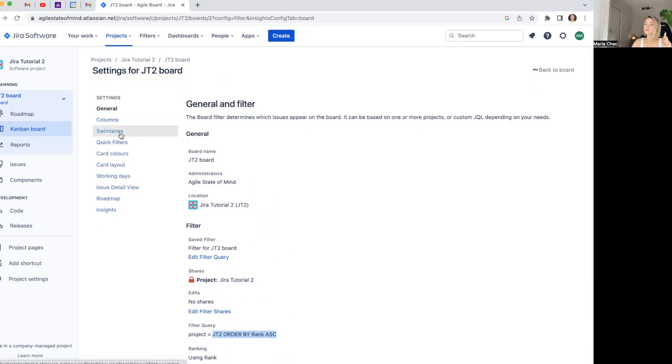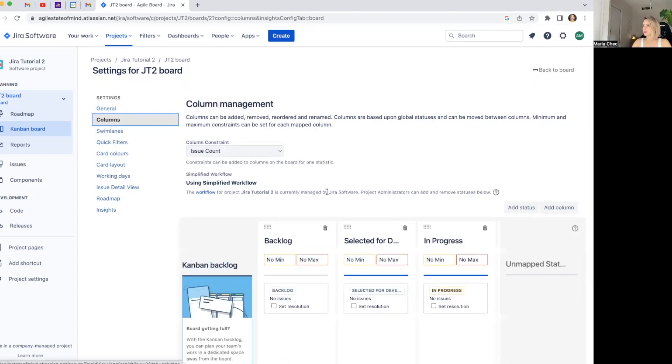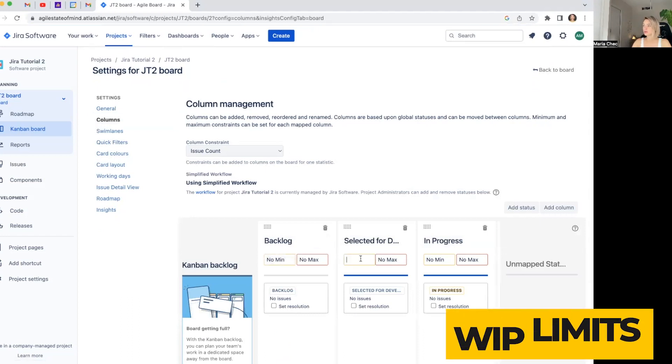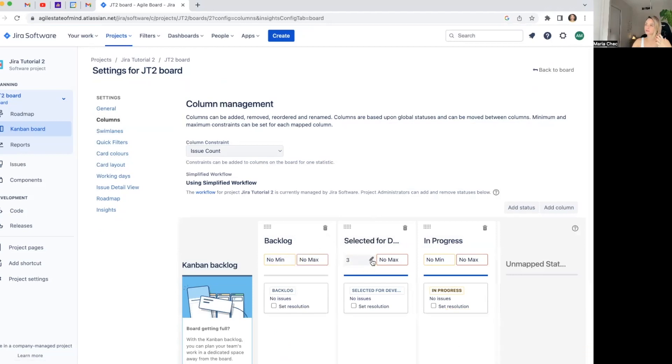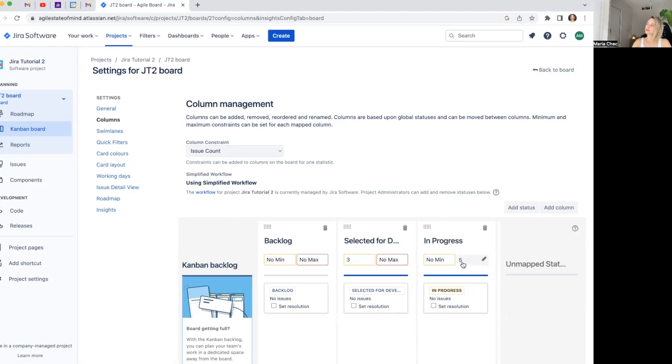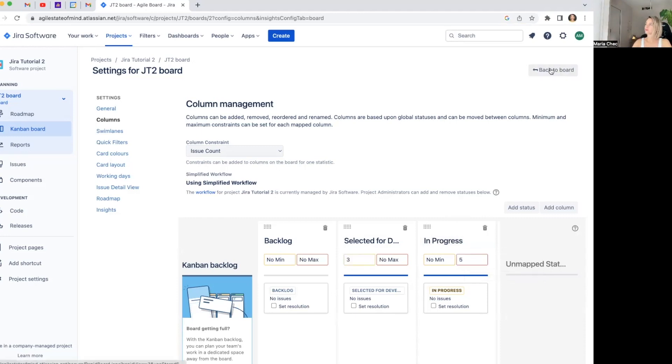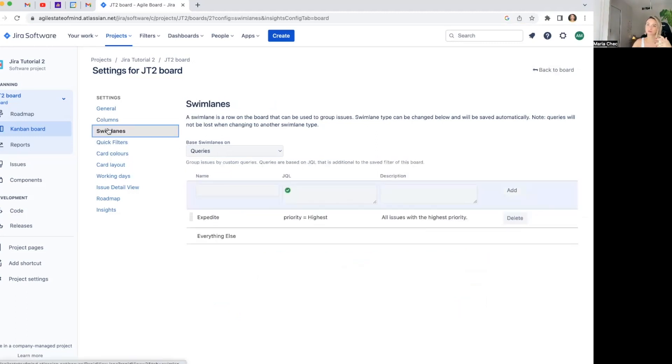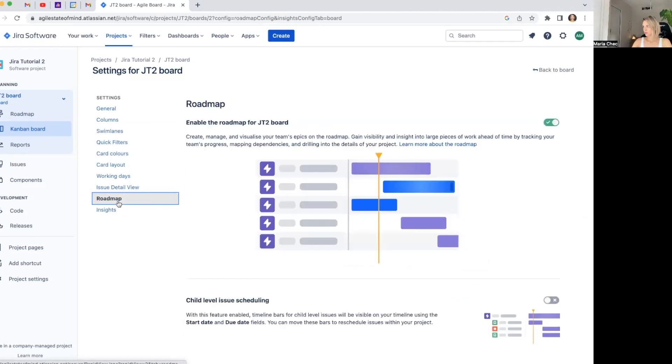What I will change though is the columns. So basically if you want to change, for example, you might want to put that we at least have to have three things selected for development. So this helps. This puts all in red when there are less than three items in this column. So usually we put the maximum for other columns. For example, in progress, I don't want to have more than five. There are a lot of people working on this, so five is okay, but not more. So when we have in progress more than five, it will go all red. And when we have not enough to select for development, it will also go red. So this is helpful. This is helpful to see at what pace we need to refine stuff and prepare it for development. And then a roadmap is already on.